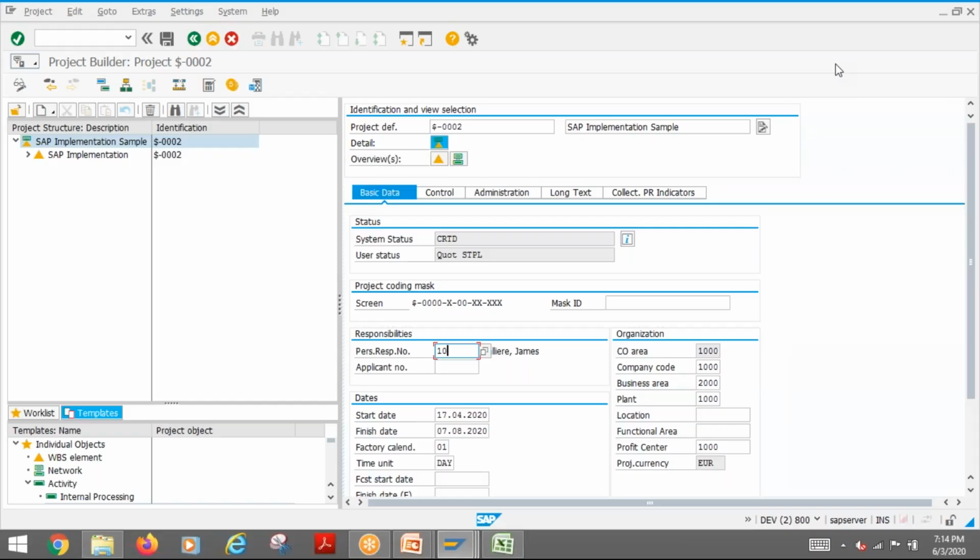This event you need to link with your workflow task. The standard task is SAP delivered and has a limited agent, only one agent. So instead of that, you create a custom task, and for this trigger, the budget overrun event, you link it with your custom task.